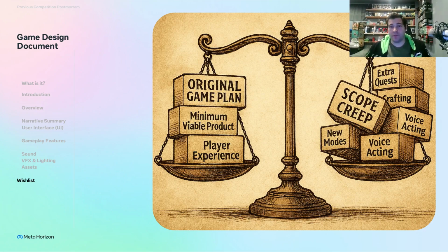So once you have developed QA'd core and secondary systems, now we can look at our wish list. Now we can start adding one at a time, QA it, test it, grab another one, QA and test it. And the reason we do this is because if I start working on a priority 3 feature before our secondary tasks are done, before you know it, I've got 5 days left before my deadline and my secondary systems aren't complete yet. So it's very important to prioritize our tasks, our features, our ideas, and get priority 1 done, then 2, then our wish list.